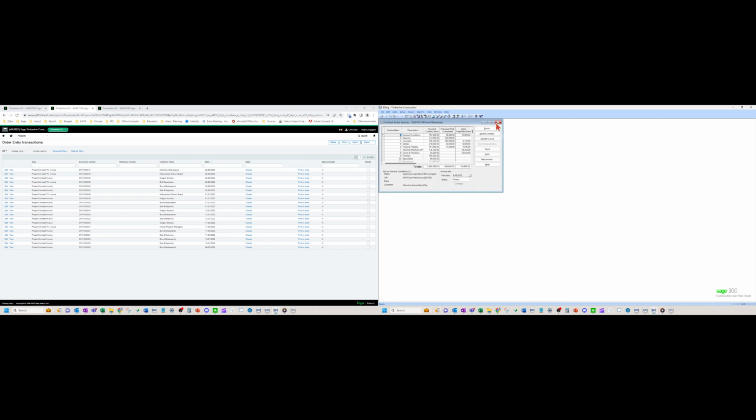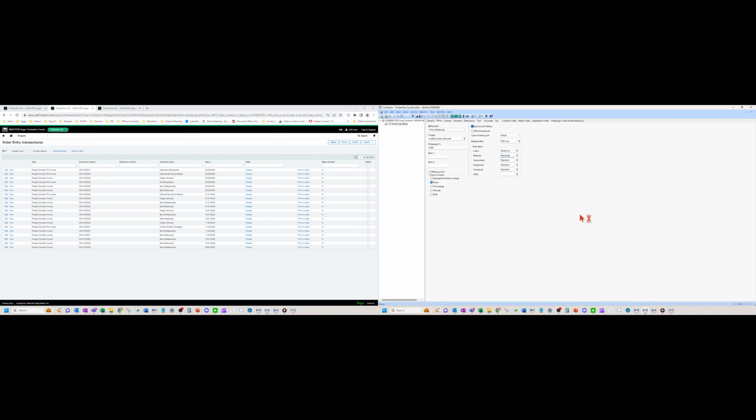you have, get rid of some of these screens here. You need to assign these rate tables and these markup tables on each line item that you're working with. So if you have a time and material line item out, you have to set up these rate tables in each one of them. Okay, you can't do that through Job Central that I was showing earlier. So you have to come here and you have to add your line items one by one.